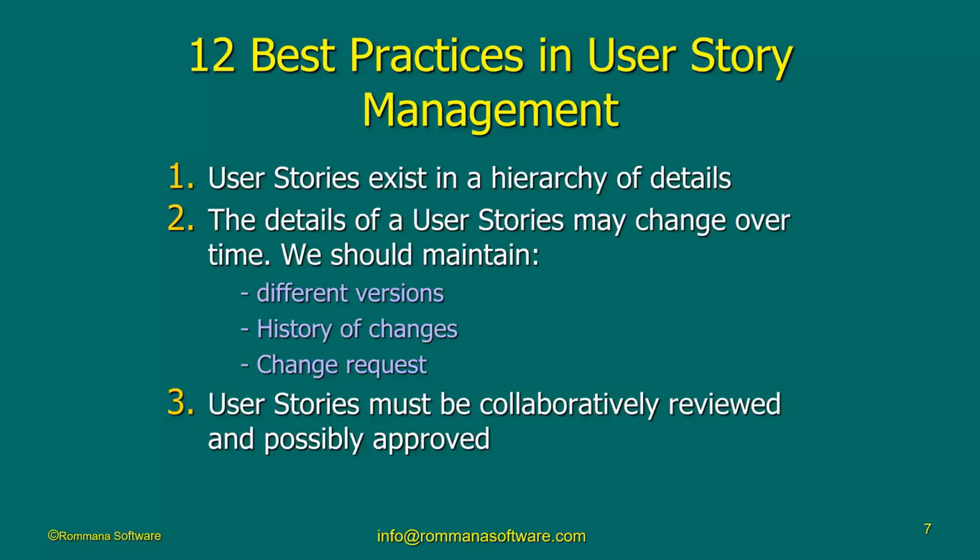Not sure why. By the way, I run Agile projects every day, and these are the things I do. If you look at my Agile projects, I do have change requests. And I write change requests myself because I am the product owner of many of those projects. And later on, we decide if we are going to make that change request a new user story in the current sprint, or a new user story in a future sprint. Or we are going to create a new version of an existing user story, and that new version will be implemented in the current sprint or in a future sprint. That is user story management through change requests.